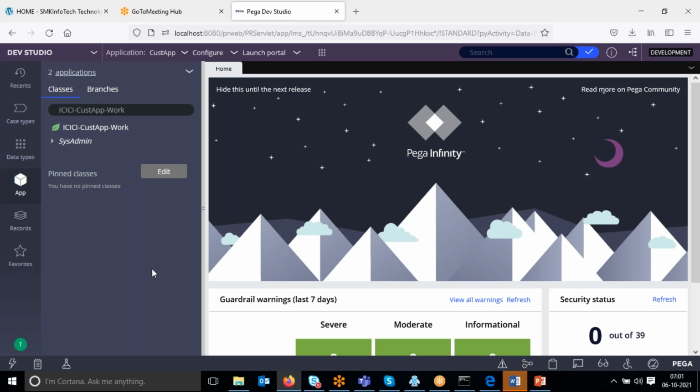He will okay it. Then for this, maybe just assume that I have already told the client, I'll give you within a month, I will deliver your requirement. So what I can do is increase resources, I can put in more developers. If you want to finish very fast, I can add more resources, but based on the resources the billing will be different.